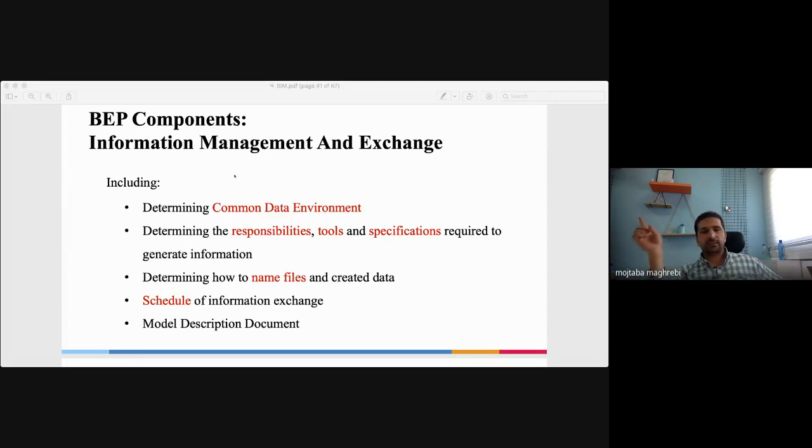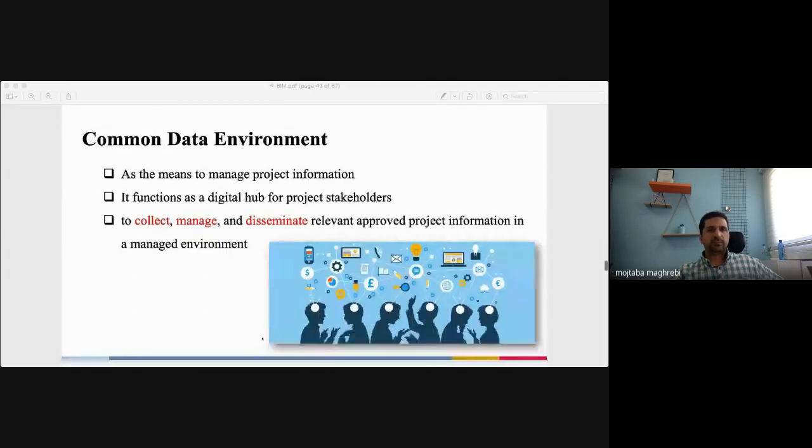Because one person can come and crop your model, you need to have a log to say, okay, for example, Mojtaba had access to these files on Wednesday from 10 a.m. till 11 a.m. and Mojtaba made these changes to this model. It needs to be controlled because of the responsibility, and because of how much money you spend to build the models.